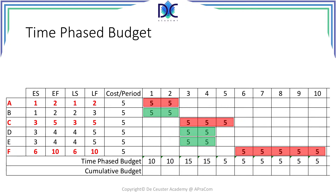How do we get the cumulative budget? We take the cost in a given period and add it to all the costs we have until then. So for period 1 it's very simple — it's 10 plus nothing from the previous period, so it's 10. For period 2 it's 10 plus the cumulative cost of period 1, which gives us 20. For period 3 it will be 15 plus 20, equals 35.